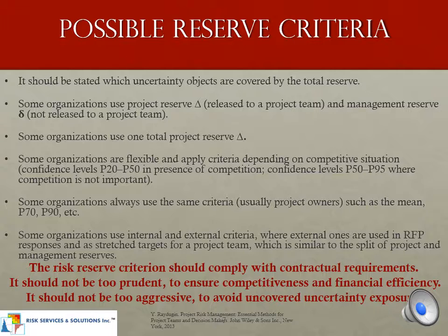The risk reserve criteria should comply with contractual requirements, and it should not be too prudent, to ensure competitiveness and financial efficiency. Okay, so it should not be on the opposite extreme, too aggressive, to avoid uncovered uncertainty exposure.